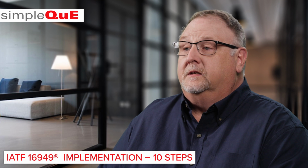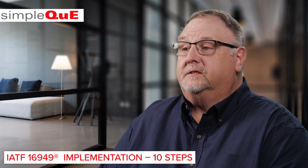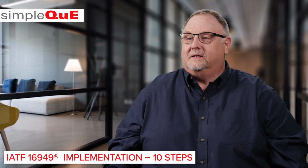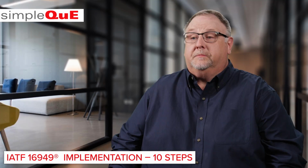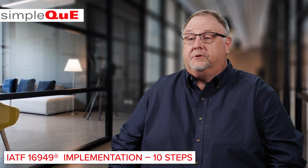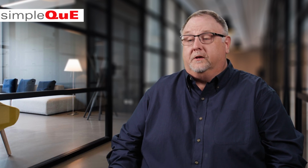Step 7, performing a systemic internal audit to find compliance issues. Step 8, taking actions to fix the audit issues. Step 9, complete one more audit to ensure the issues are fixed and the systems have improved. Step 10, preparing for registration by contacting a certification body to conduct a Stage 1 readiness review.